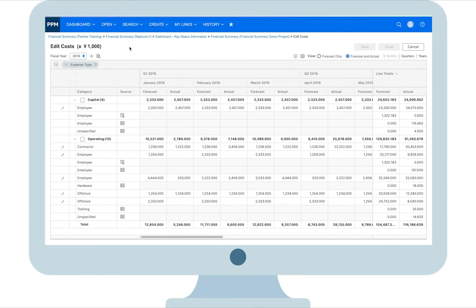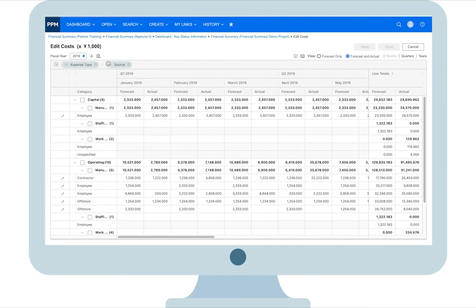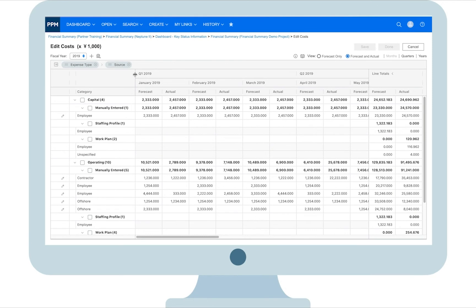You can group costs by as many columns as possible. For example, if you want to see which cost is rolled up from the work plan or staffing profile and which cost is manually added that needs adjustment, just drag and drop the source column to the grouping area. Cost lines of the same source are grouped together.